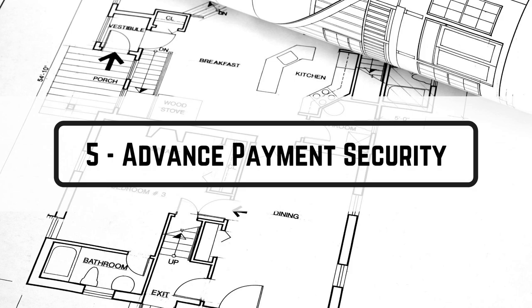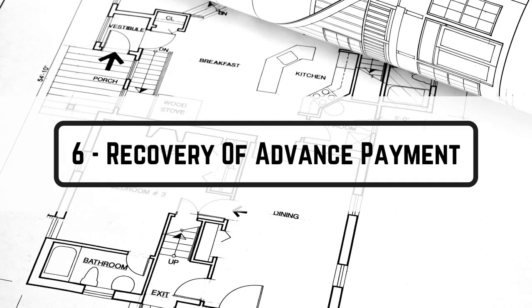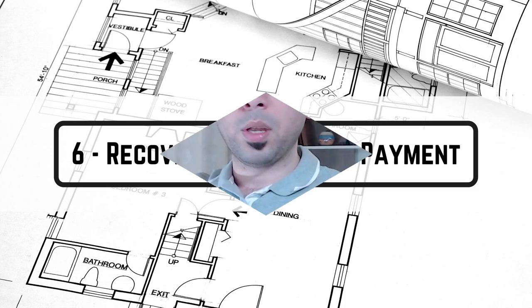The fifth term is advance payment security. Advance payment is paid upon signing the contract before starting the works, so what is the guarantee for this amount paid against nothing — no works have been done yet. You have to keep an advance payment form of security in the contract, which can be a security check or bank guarantee. Money must be paid against something — either work done or a form of security.